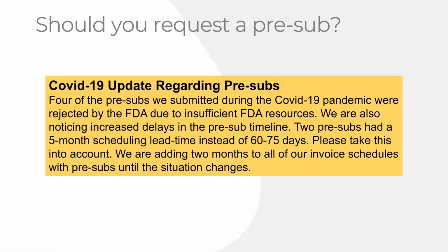Which brings me to one of my points I wanted to make about project management of any project, but 510Ks in particular. When a company says, well, let's estimate how long this will take. Oh, we'll say it's going to take 4 weeks. Test that. Go get a quote from 1 or more vendors that says they can actually deliver in 4 weeks. Look at what the timeline was to complete that same task in the last 510K project you worked on, if you've done a 510K project before.